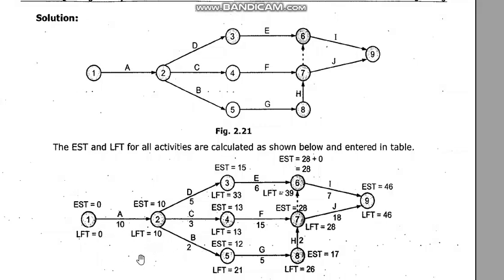Now you have to find out the critical path. The critical path, first node and last node will always be there in the critical path. So you have to start here. So there is only one route, you come here, but here there are three branches. Now you have to choose which branch you will go. Okay, and here now there is a difference between these two timings, so these two cannot be in the critical path. So this is the critical path because these two values are same.